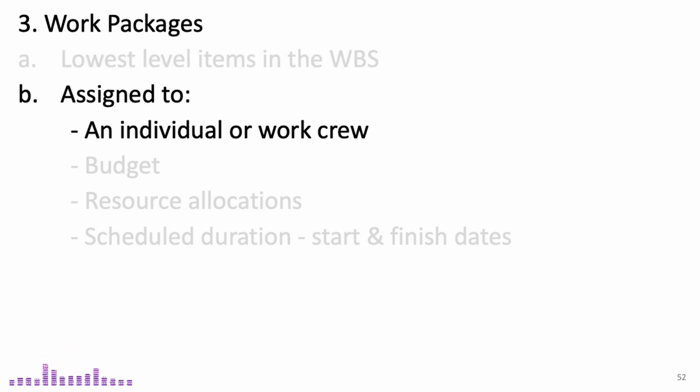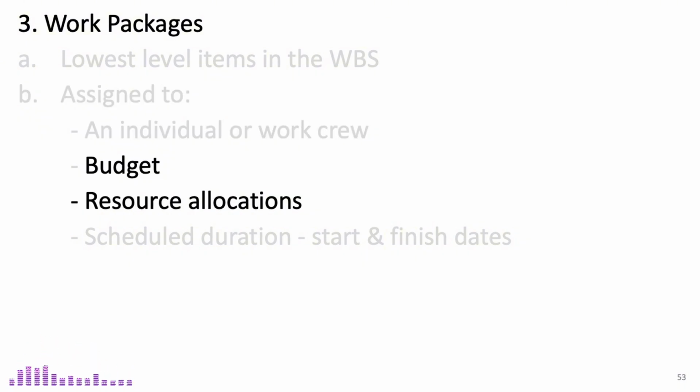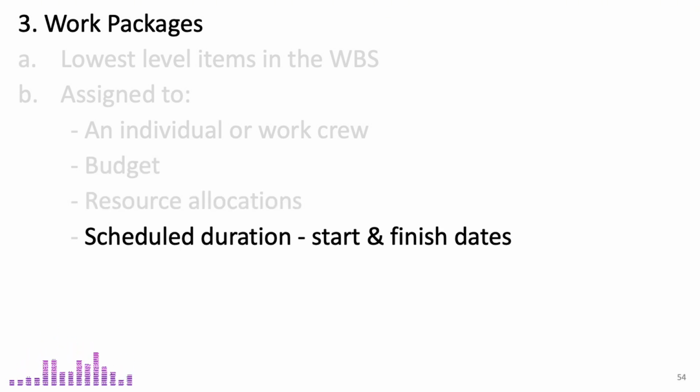Each work package is assigned to an individual or work crew who are responsible for its completion. It also has a budget for financial tracking, specific resource allocations for materials and personnel, and a scheduled duration, including start and finish dates, to ensure it's completed on time.